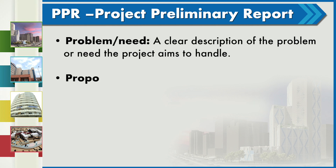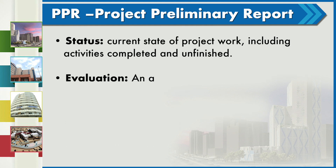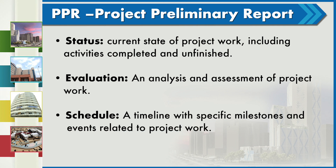Preliminary project reports should include: identification of the problem — a clear description of the problem or need the project aims to handle; proposed solution — a brief description of how to address the problem; methodology — work effort analysis and summary of relevant work; status — the current state of project work including completed and unfinished activities; evaluation and analysis; and scheduling — a timeline with specific milestones and events.